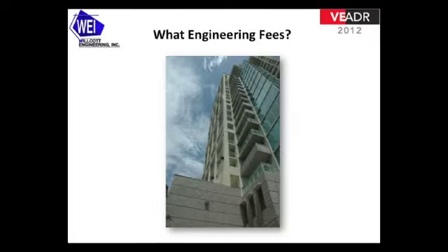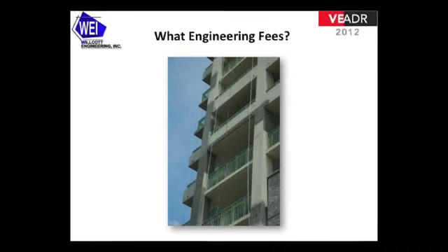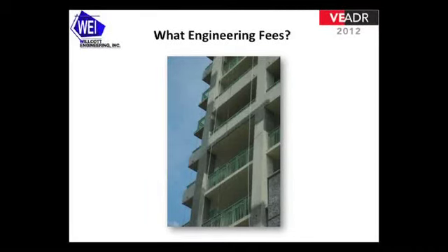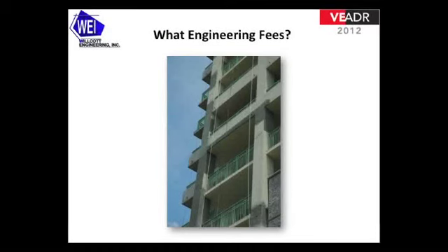On the plus side, the same Ritz-Carlton facility spent $1.6 million on exterior facade, stucco repairs, repainting of aluminum handrails, sealant, and field engineering was involved during the course of that. Selective repairs were performed. By having field engineering, you get to put limits on the extent of repairs, and you can help hold the contractor to what it is you contracted for to start with.